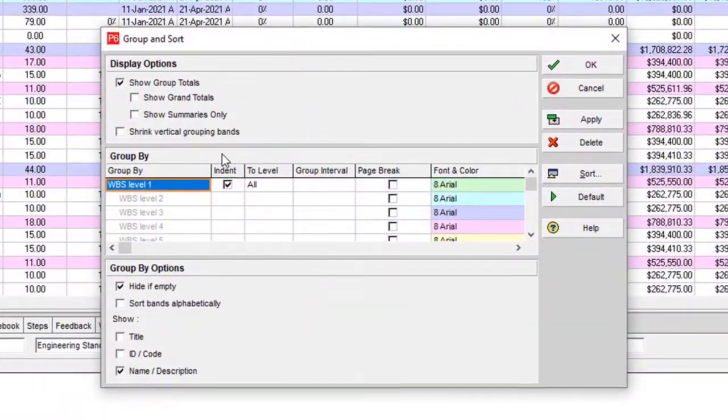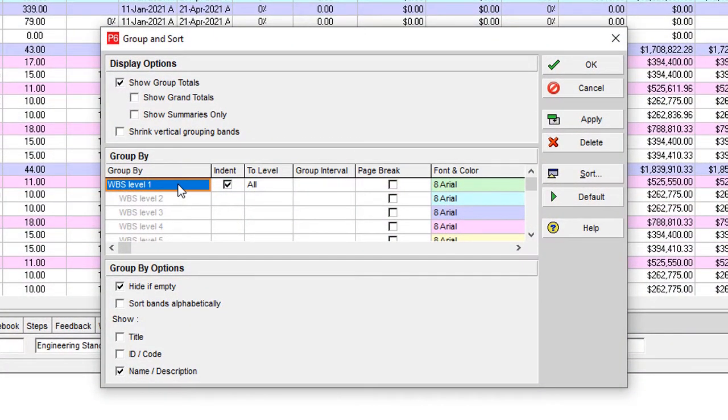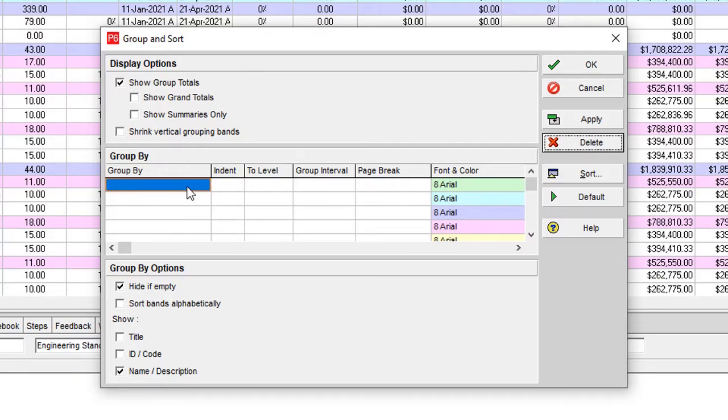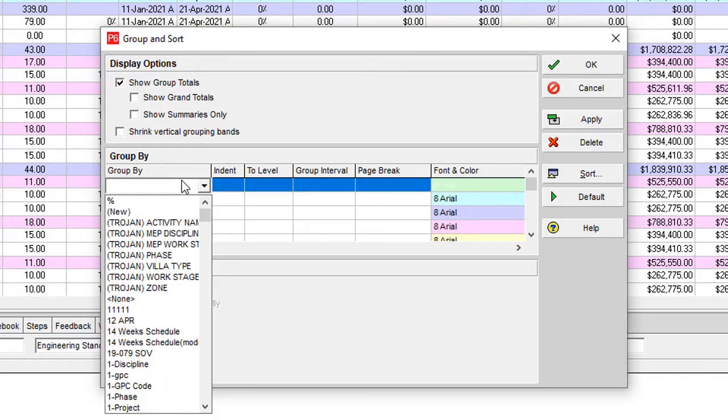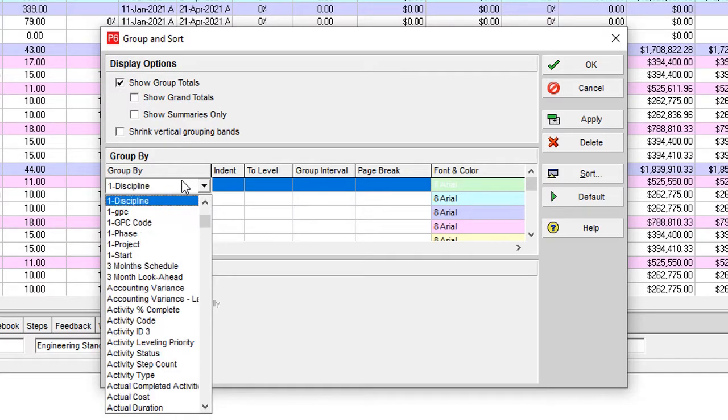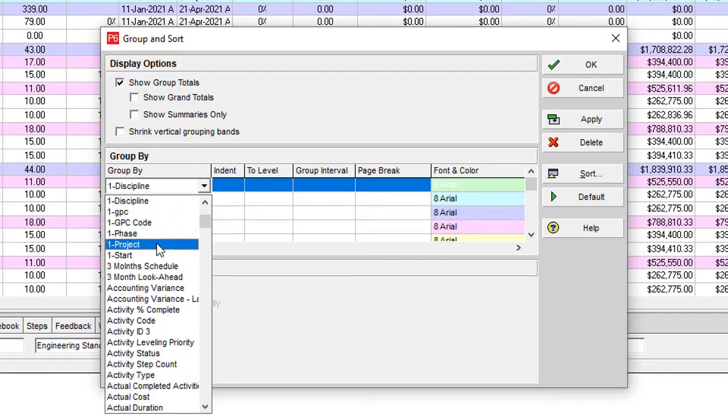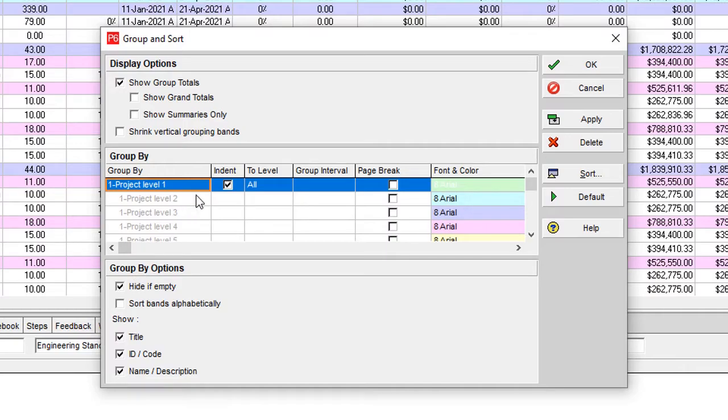Go to the Group and Sort, then remove the WBS. Instead of using WBS for this item, you should use the activity code.